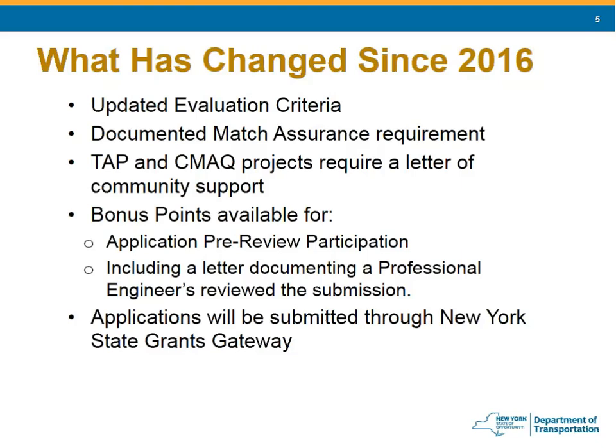We've also found that participating in the pre-review process benefits applicants and makes for stronger applications. We strongly encourage participants to take advantage of this review. To encourage this, we're offering five extra points to anyone who attends a pre-review — this is very important and could make or break your application. Similarly, five additional bonus points are offered if an applicant includes a letter from a professional engineer attesting to the deliverability of the project. This helps ensure a successful, well-developed project.